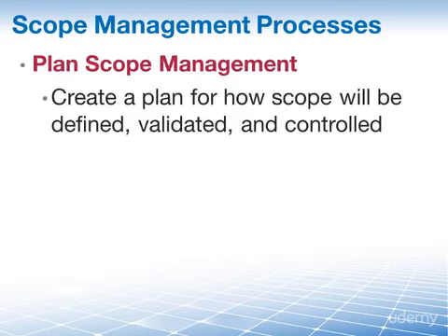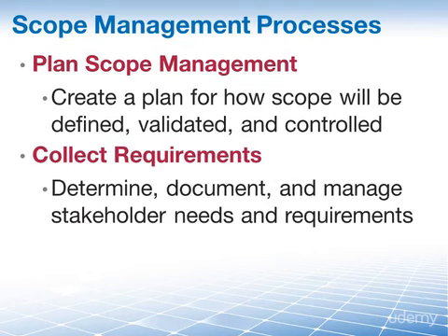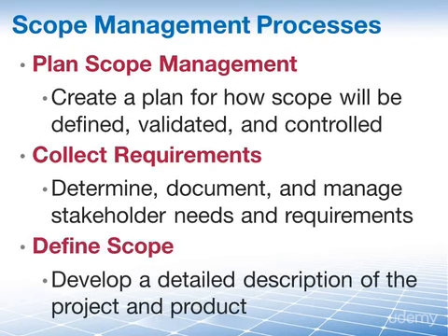First of all, we have plan scope management, the process of creating a scope management plan that documents how the project scope will be defined, validated, and controlled. That is followed by collect requirements, the process of determining, documenting, and managing stakeholder needs and requirements to meet project objectives. Then we will define our scope. This is the process of developing a detailed description of the project and the product.